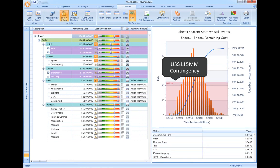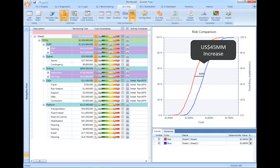The example here shows a cost-risk exposure demanding $70 million of contingency, yet when we look at the additional impact being driven by schedule risk delay, we can see that the amount of required contingency increases from $70 million to $115 million, with a net increase of $45 million.